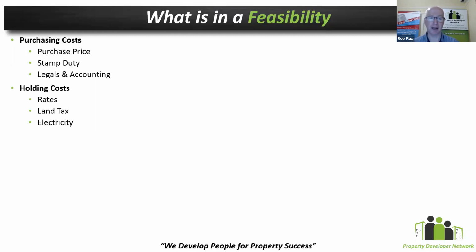Then you've got things like holding costs. Now, I'm obviously trying to be simplistic here. There's a hell of a lot more holding costs and a hell of a lot more elements to each of these as we go. But the holding costs are the costs that are just going to keep hitting you as the project keeps running. So you've got your rates, you've got your land tax, electricity, depending upon the kind of property that you might have.